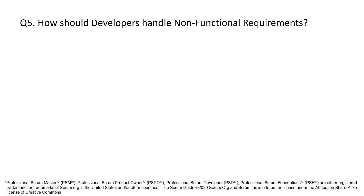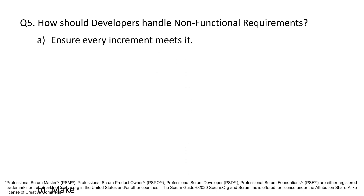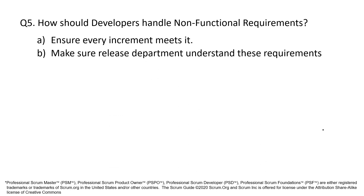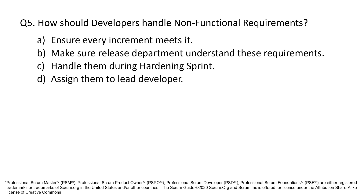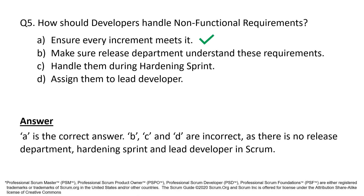Question 5. How should developers handle non-functional requirements? A. Ensure every increment meets them. B. Make sure the release department understands these requirements. C. Handle them during hardening Sprint. D. Assign them to the lead developer. A is the correct answer.